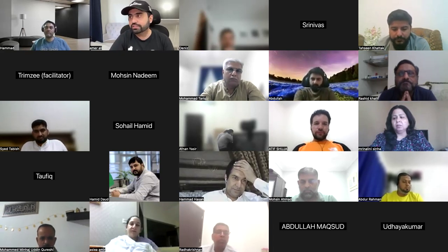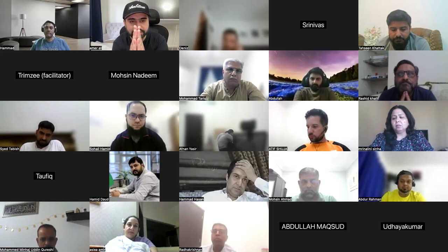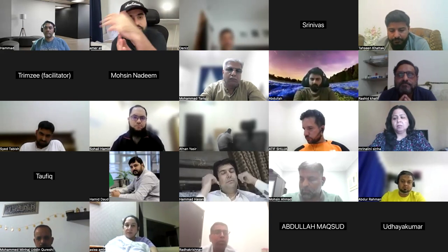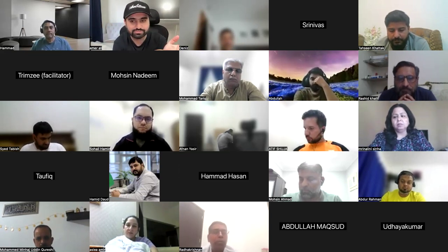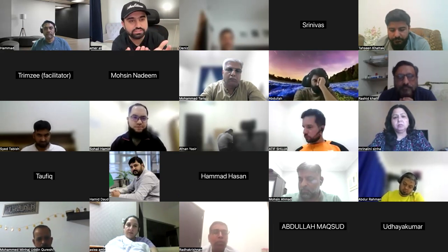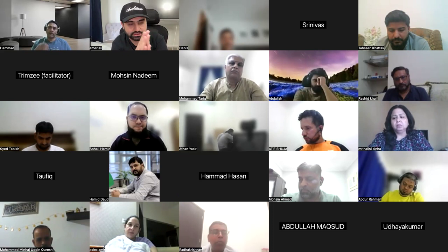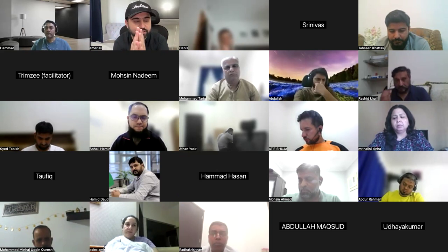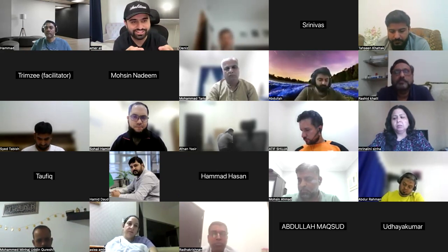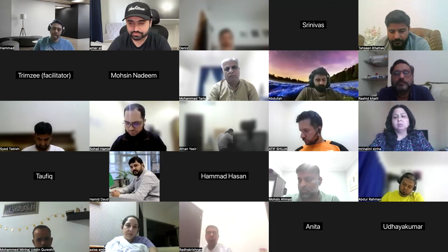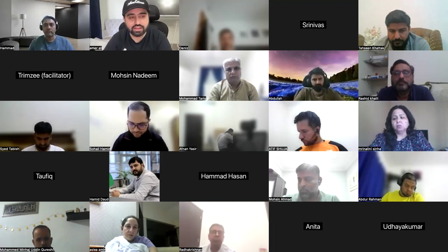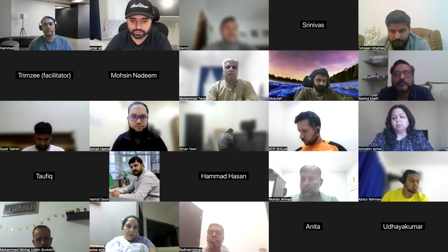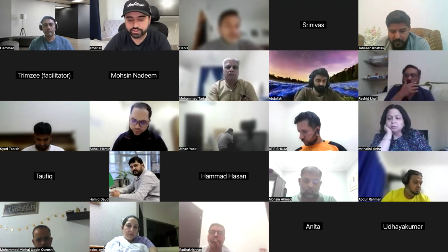Kill point is that when a phase ends, you go to the project manager, you go to the governance board, they review it. Shall we move forward or end the project? When you take a business case to your governance board, they decide, shall we move ahead or kill the project? Or any time in the project, when we reach a decision, shall we go forward or end the project? That is a kill point. It's like a phase gate review. It happens at every phase gate review, but it can be any time when the project reaches somewhere where you have a big problem, like, shall I move ahead or not?